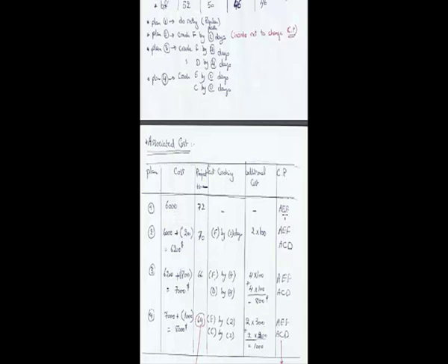And the critical path here was AEF. And then in plan number 2, we have suggested that we crash F by 2 days, so it decreased the project time from 72 to 70, and the cost 6,000 has increased by 200, which is the cost of activity F. Each additional cost per day is 100, and we have crashed it by 2 days, so 2 multiply 100 equals 200.